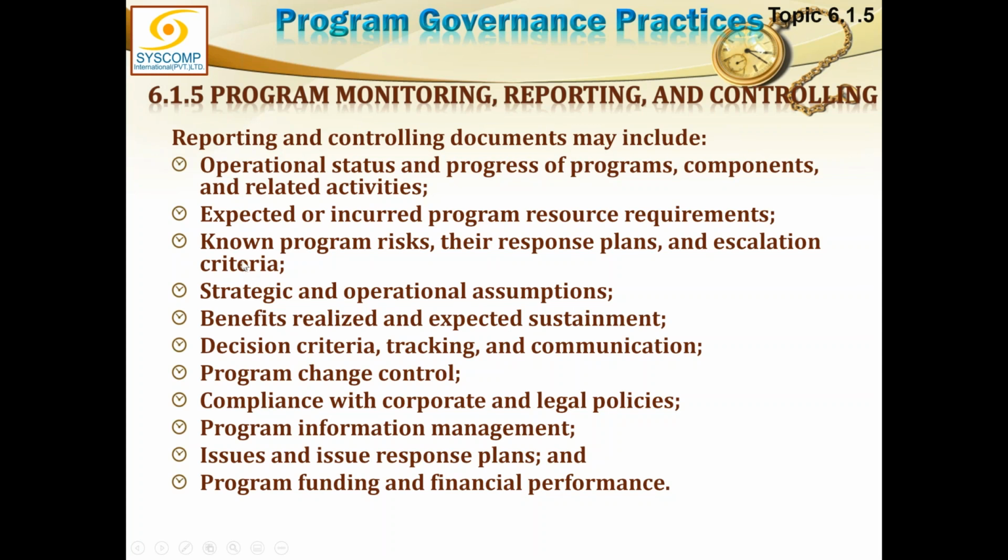But generally, who will typically give the KPIs? Will they be given by the governance board? Yes, the governance board will be asking for certain information, and the program manager will be providing those KPIs. Naturally, KPIs are prepared after thorough analysis of the basic data. Whatever the performance on the ground is, that will be analyzed and converted into the accomplishment of certain KPIs, and those KPIs will be reported back to the governance board.